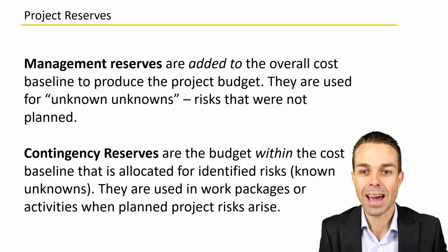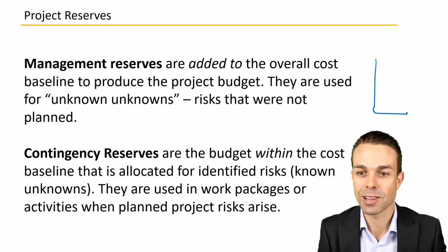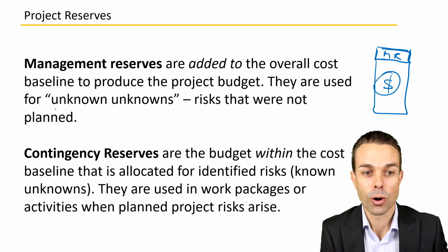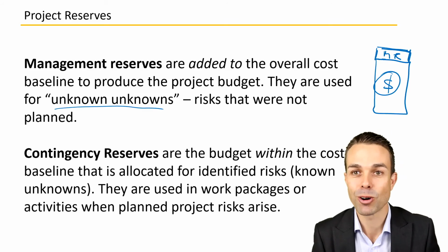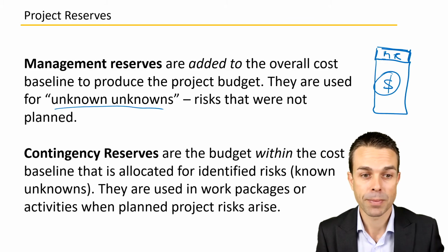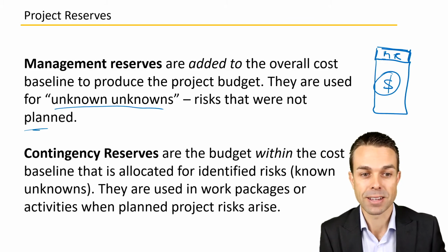Management reserves are added to the overall cost baseline. So let's say we have the overall project cost baseline here, that's our project cost, and then we actually add a little bit onto the top of that as our management reserve. Now that's used for our unknowns, things that we have not foreseen, things that we haven't looked at, risks that we did not know about or that could happen, risks that were not planned, in other words.